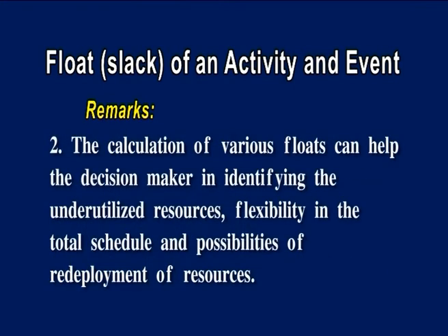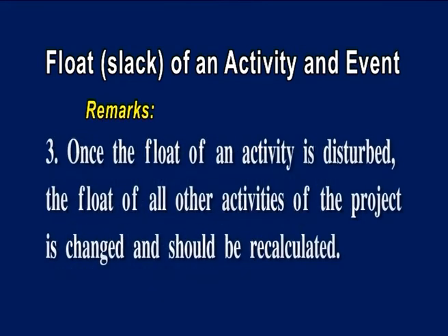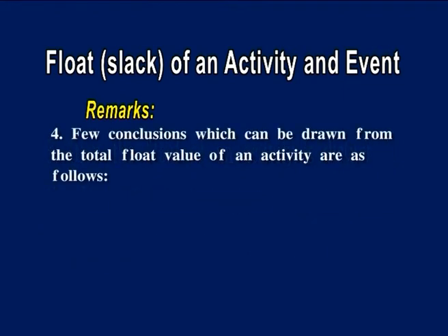Secondly, the calculation of various floats can help the decision maker in identifying the underutilized resources, flexibility in the total schedule and the possibilities of redeployment of resources. Third, once the float of an activity is disturbed, the float of all other activities of the project is changed and should be recalculated. Fourthly, a few conclusions can be drawn from the total float value of an activity, as follows.